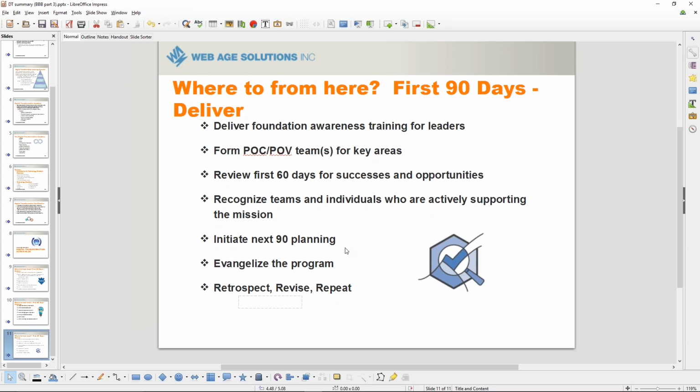It is better to be having a direction we're going and a next 90 days of near-term visibility than to have a detailed longer-term plan that we are just going to have to rewrite when we determine that it doesn't actually fit all of our future needs.